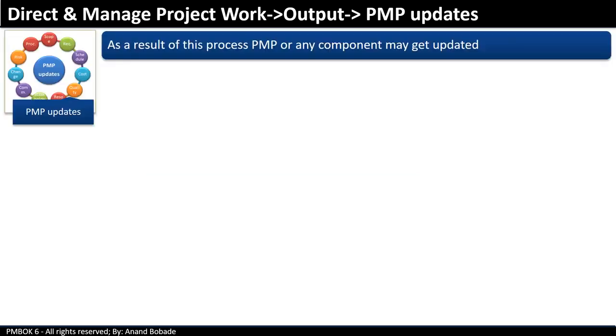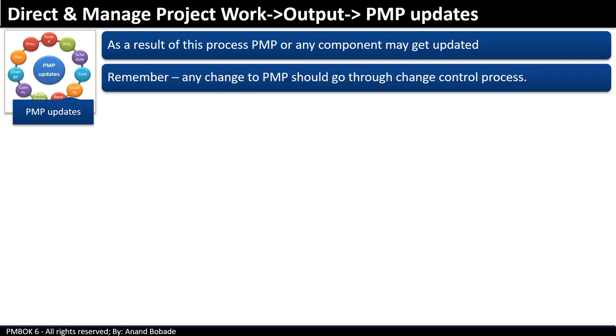Another output is project management plan update. So as a result of direct and managed project work process, any component of a project management plan get updated. Remember, any changes to PMP should go through organization's change control process.